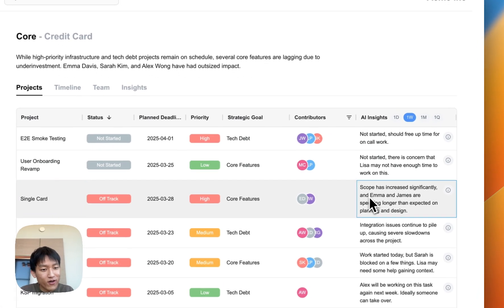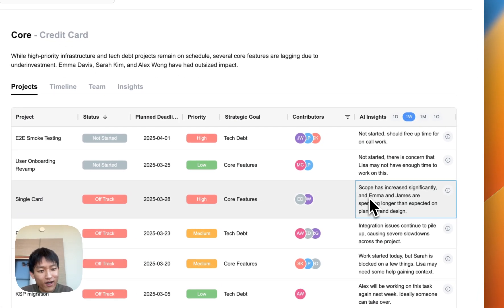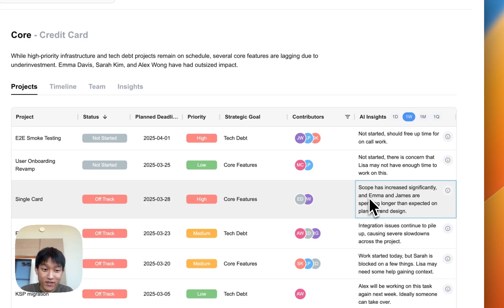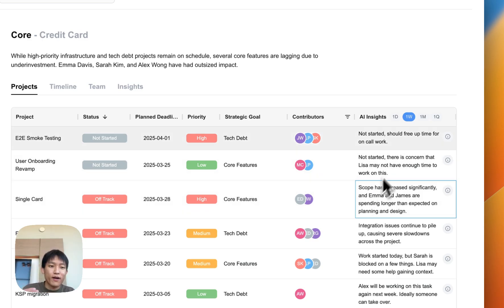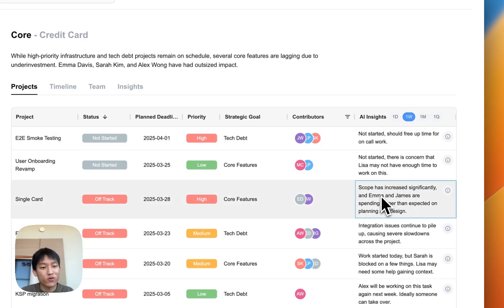Oki is able to tell you that not only is it because Emma and James are spending longer than expected on planning and design, but it's also, in the past week, scope has increased quite significantly.